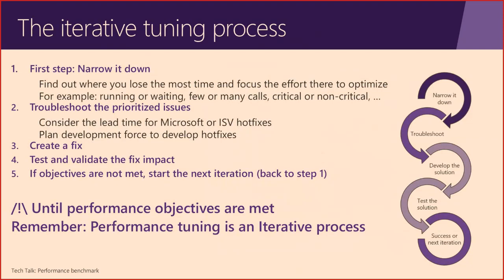The final critical aspect for the performance benchmark is really that it's an iterative process. Most of the time, the project managers will allocate just one iteration to do a sort of validation of the performance, but it's just not enough. You're going to have multiple loops, multiple iterations to basically identify the bottlenecks, if actually the scenario is running or not, if there's a few or many calls, if there's a